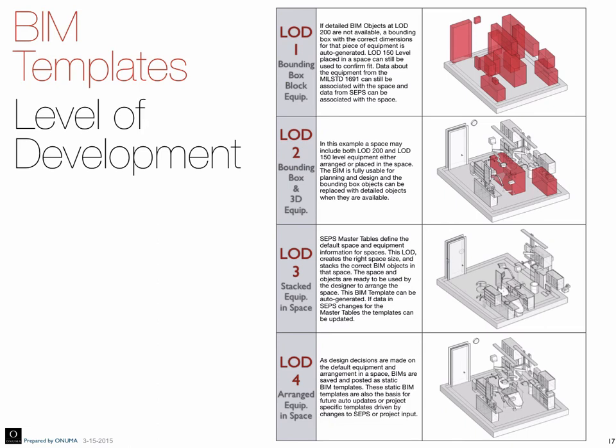Level of development 3 is what we call the delivery truck method. It's essentially SEP says there's 30 pieces of equipment in the space, and the database can automatically generate a BIM. You'll see some other tools in subsequent webinars that we are planning on having on how SEPs can automatically generate these spaces even if there's no layout. But the actual LOD4 that you're delivering back is going to be the basis for future projects that say, well, we need 20 exam rooms. It'll actually have the layout with the right equipment and position as a starting point and can be used for actual projects.